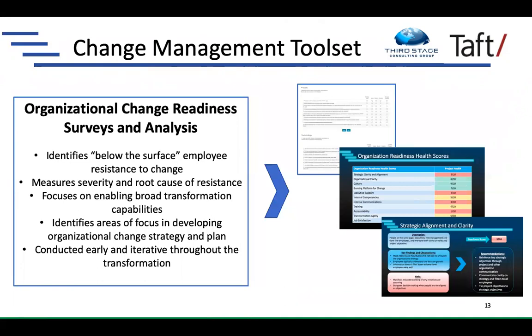And then from that, in this middle box here on the right side, we come up with an analysis of the level of readiness, looking at change through a number of different lenses like culture, organizational clarity, alignment, training, accountability, et cetera. What you do here is identify the areas where you're strong. Most companies have a handful that they're pretty solid on, at least for the time being, based on where they are in the project. Then you have other areas that are red, high priority areas, and some yellows that are kind of neutral.